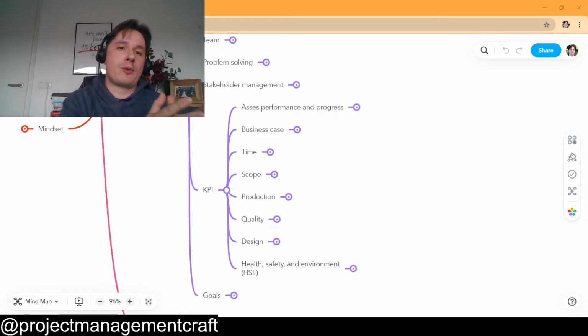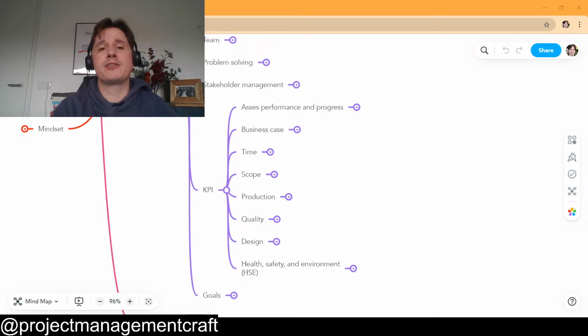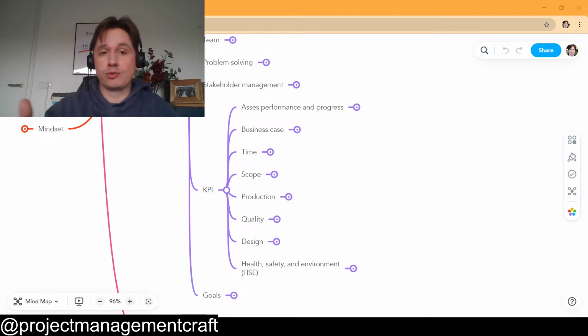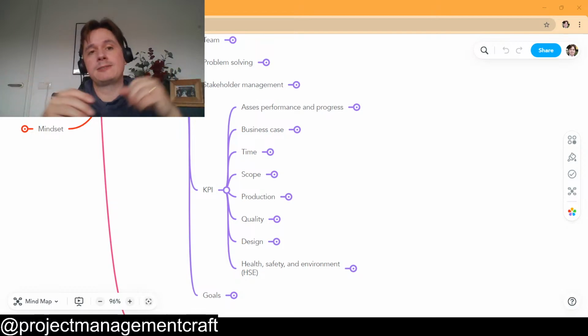So I also had a KPI for the design team. For my project, what matters for the project, my KPI for the design team was heavily focusing on drawings that were released or lists of materials that were released. Why? Because I could only do anything in the construction or buy the material if the list was released or if the drawing was released.